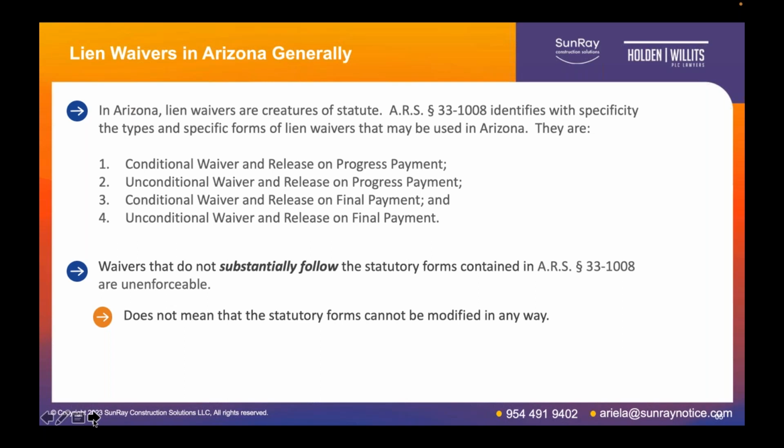Now, the waivers that are used that do not substantially follow the statutory forms contained in the statute I just referenced are unenforceable. So it's important, and we'll cover this in the do's and don'ts, to make sure that you're signing a statutorily compliant lien waiver.